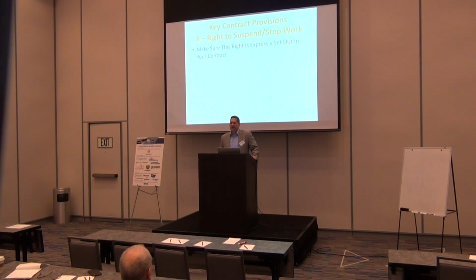What it means, though, is if you're out on a project and you haven't been paid for 2 months, your only leverage is to stop work, and you should be able to do that. General contract law would give you that right, but there's no clear line. General contract law says when it's a material breach, a significant breach, you can be relieved of your obligations. It's easier if you have something that says, I have to get paid within X number of days.